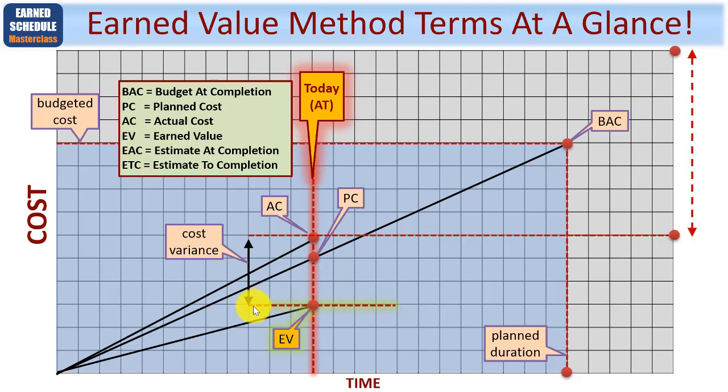So here, since actual costs are higher than earned value, you know that your cost variance is showing you that you're going to overspend. In the same way, using earned value as your point of reference, noting at this moment in time the planned cost was greater, this gives you your schedule variance, and again in this example I've shown, this shows you're going to come in late.